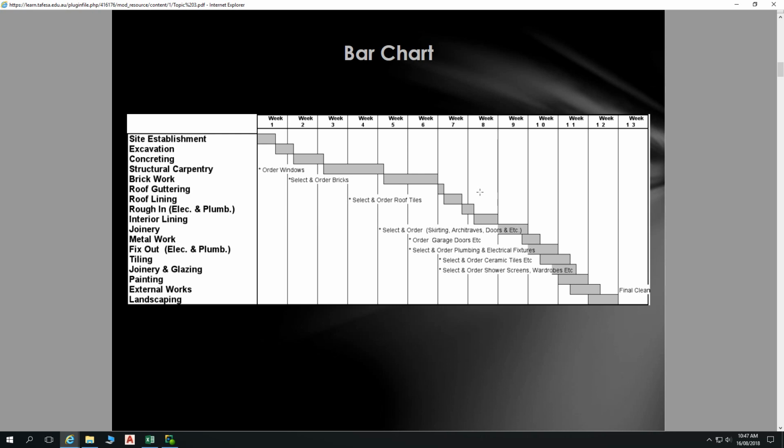All of our joinery. Yeah, the final clean-up, isn't that sort of like a detail? Because they actually just make sure that all the windows are clean, and basically do a real tizz up on the place. Pick off the stray little bits and pieces. It's just a final check, really. So you do clean up, and then the builder will do the inspection, and then you have the walkthrough with the client.